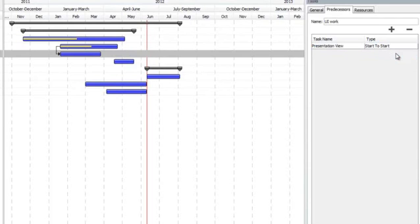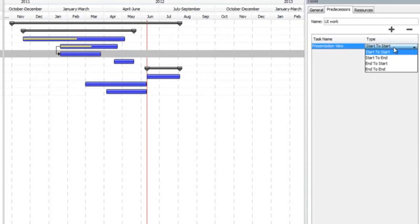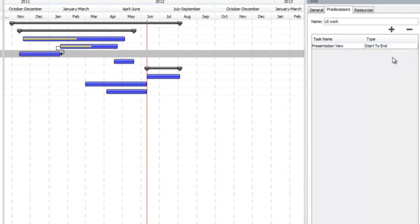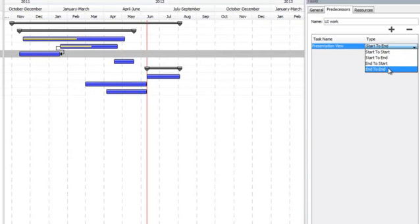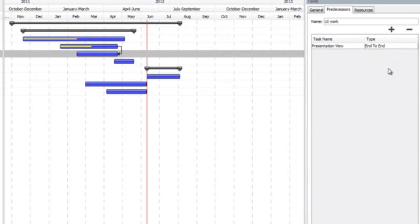There's a few different options. You've got start to start, which starts both tasks at the same time. Start to end, which is you actually invert what we saw before. But also, when this task ends, the next one starts. And start we saw at the beginning and end to end, so both of them line up.